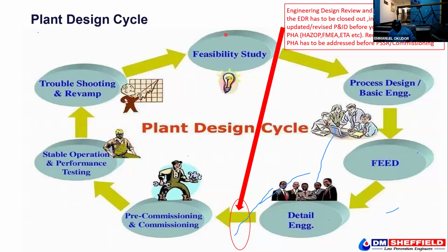No, the post is we need to ensure during the construction that the valves that are supposed to be open will be open. The drain valves that are supposed to be there, somebody is saddled with the responsibility to follow up with the construction engineers to ensure they are there in terms of pipe size, valve sizing, and the specification of valves,